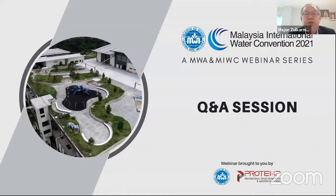What is the lead time for complaint resolution, especially if it involves potholes or any road damage? Okay, we have an emergency response team and task force. If our subcon doesn't take action within 2 hours, our task force will come in, but for temporary repair. So I will say the response will be 24 hours. I think I've answered this one.